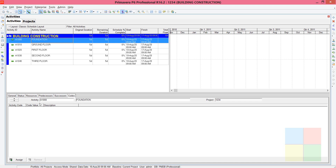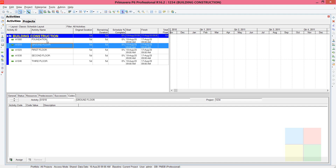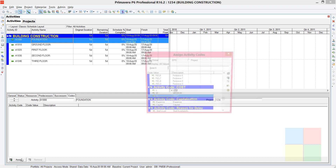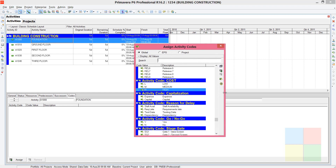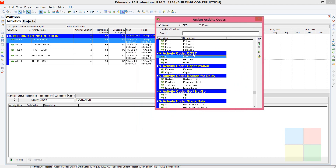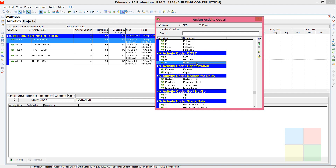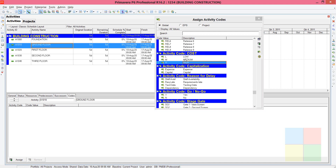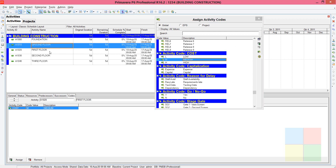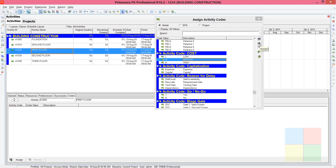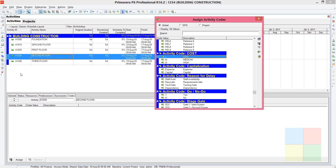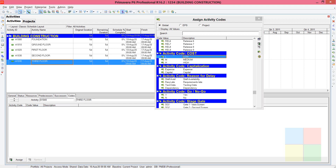Click Assign. Note that you highlight the activity first — I'm highlighting the first activity (Foundation) and going to Codes, then Assign. In the box you can see: 'L' for Low Cost, 'M' for Medium Cost, and 'H' for High Cost. I'll assign Foundation as High Cost, Ground Floor and First Floor as Medium Cost, and Second Floor and Third Floor as Low Cost.